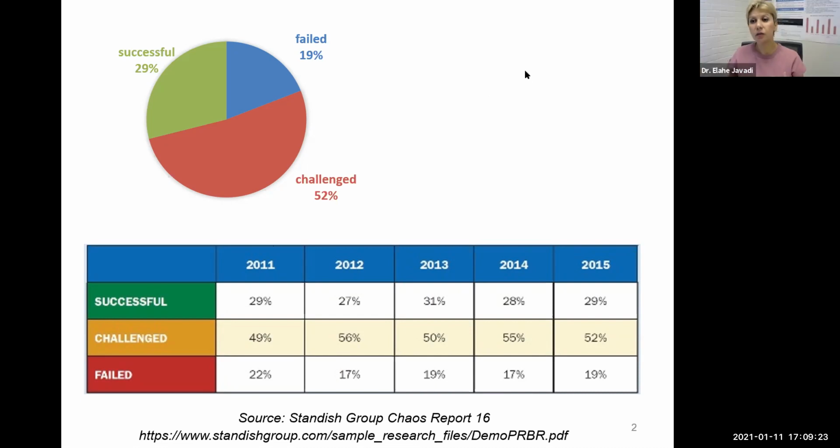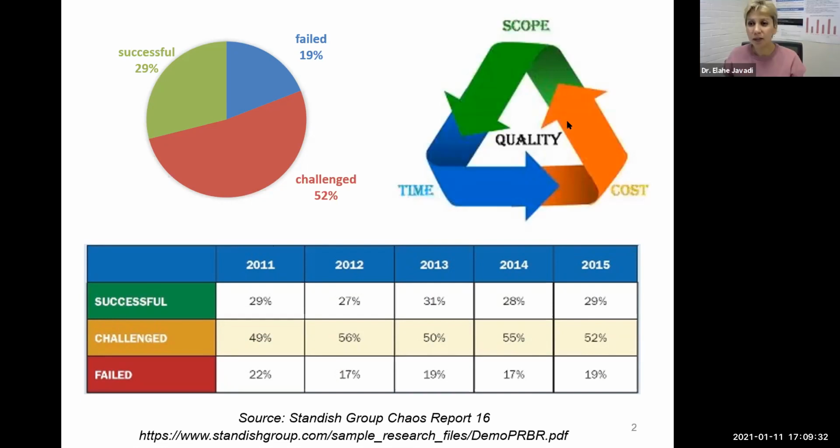Perfect. So the human resources and what you spend on them, it will impact your time and cost. So what you gave me is the triple constraint. What we call this triangle is triple constraint: time, cost, and scope. They are interrelated. So if you want to finish a project earlier, it means that you may need more money, or you may have to shrink the scope, the list of features that you're delivering.